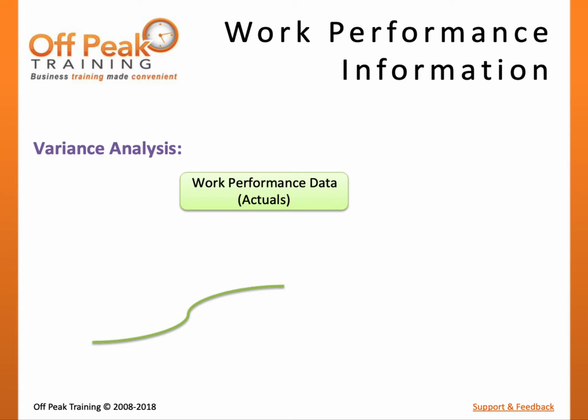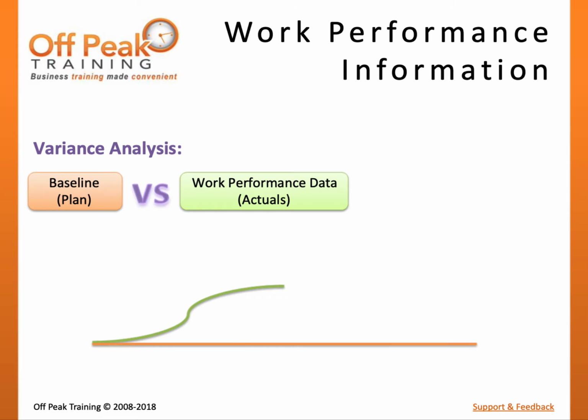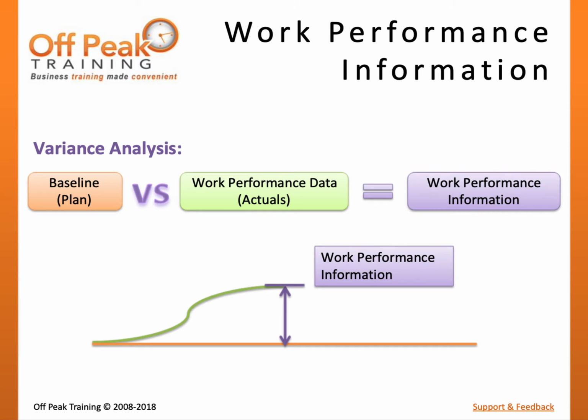It is in the control cost process that we compare this work performance data against the plan or cost baseline through our tool and technique called variance analysis. This gives the data context, as we now have measurements or work performance information. This will be an important step for reporting performance to project stakeholders.